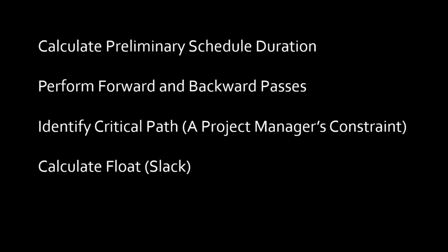I'll explain what float is, well, maybe I should right here. Float is the ability to move a task up and down the schedule without affecting the critical path, okay? I want to know that. I want to know it's my wiggle room as a project manager. It's another place where I can do nips and tucks and adjustments without doing major surgery to my schedule, okay? And again, activity on node, where all the activity information will be in the node itself, all right?